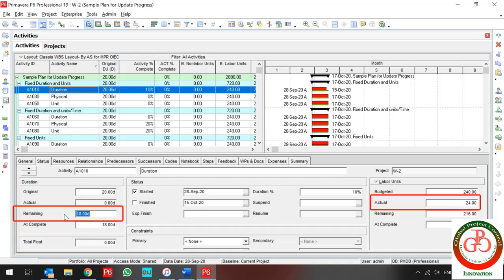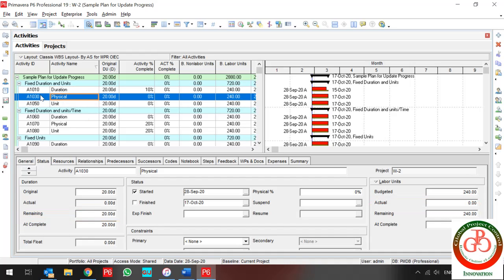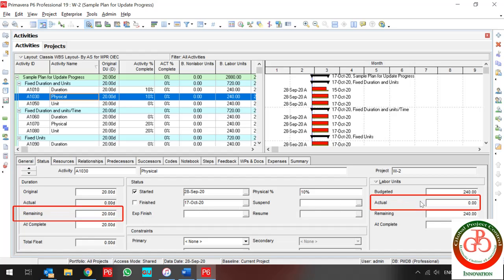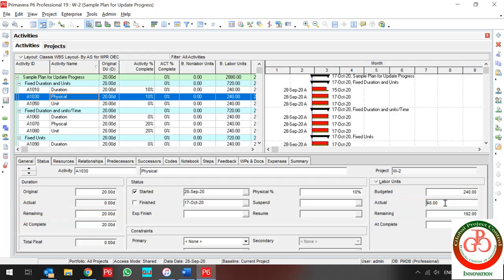For the Physical activity with Fixed Duration and Unit, I push the checkmark for the Start button, but I enter 10% and nothing happens. So I can enter this field manually — for instance, 48. But you can see the remaining duration does not change. I want to update the remaining duration to 18 days.